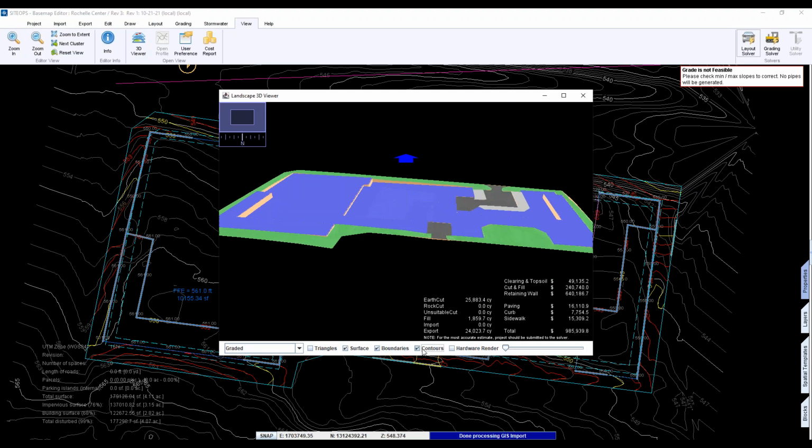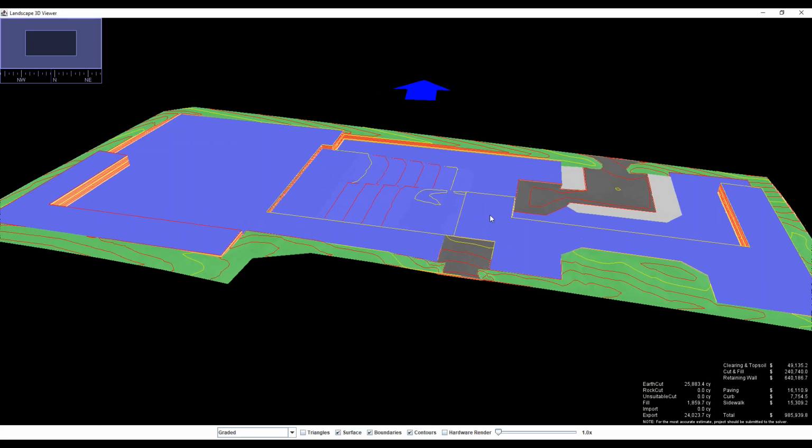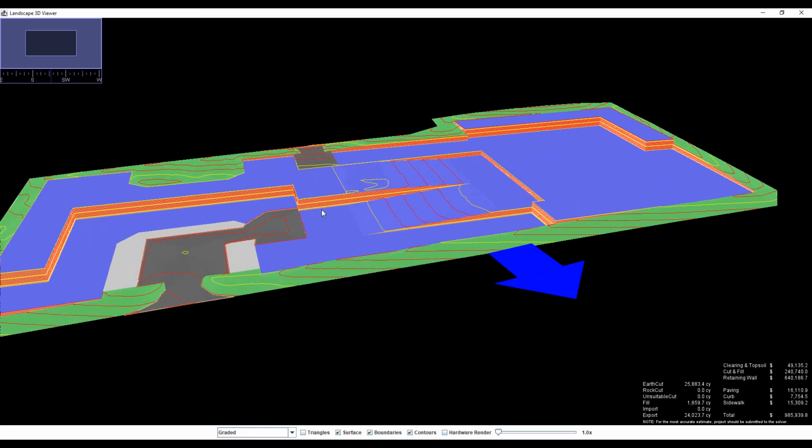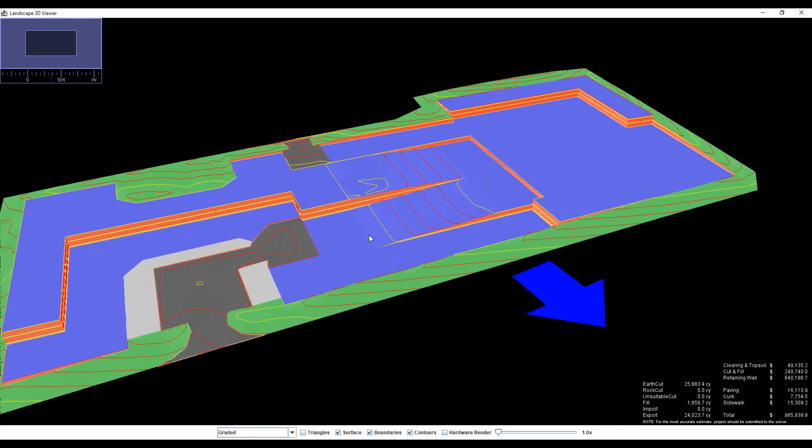And when we evaluated the way the parking deck wanted to work, so in this case, this was the parking deck entry right here. The architect wanted to make a turn here and ramp this side up. And what it was doing is, we see right down here, we've got a 24,000 yard export. So before, when we did it his way, we had a 35,000 yard export.